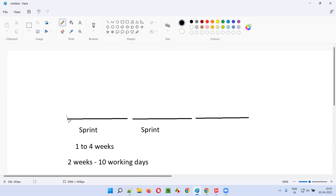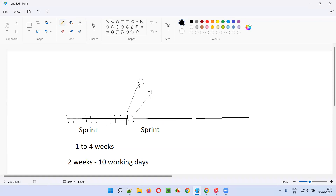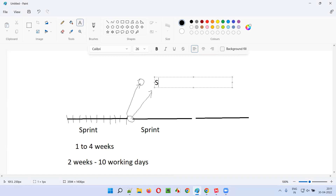The scrum team will be working on the user stories assigned to the sprint. If it is a two-week duration, by the end of the 10 days, the work will be completed. In the last day, once the sprint ends, a meeting will be conducted before the next sprint starts — in between the previous sprint and the next sprint. This meeting is known as the sprint retrospective meeting.